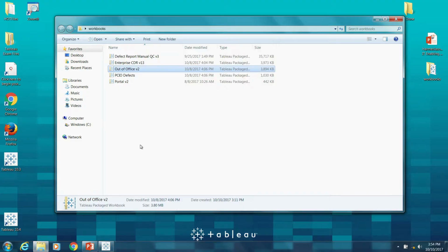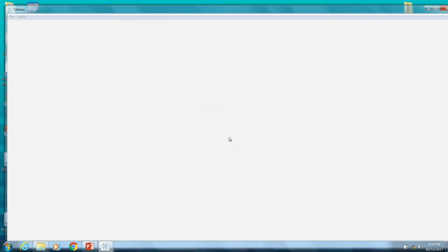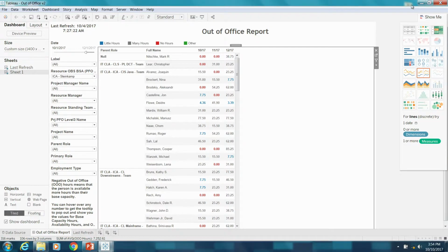So anybody who uses Clarity will understand that you actually have a calendar of when you're available within the tool, which sounds a little redundant if you have any other HR system to manage time off. But what that does is if you put time off in Clarity, that will lower your availability for that month, which means if you don't take those hours off in a given month, it looks like you're available to work.